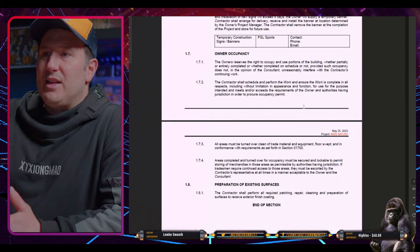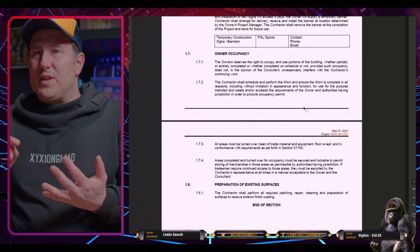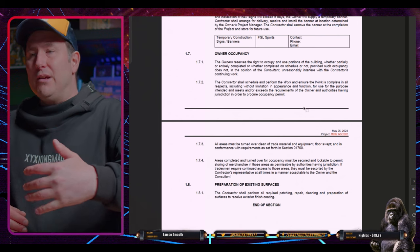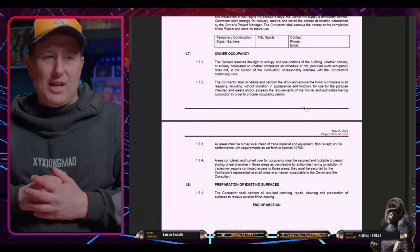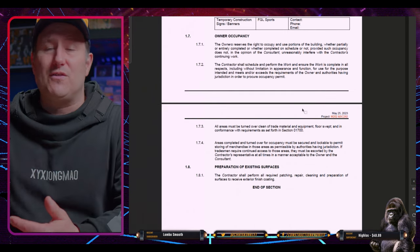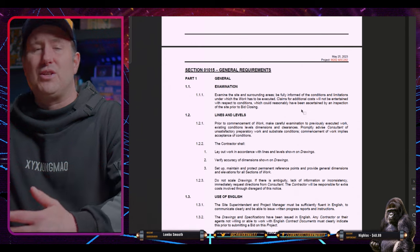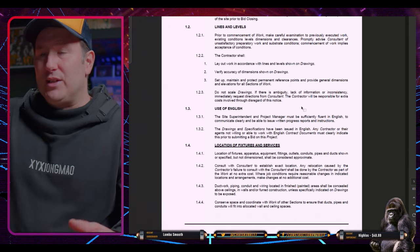Okay, it'll tell you things like your safety requirements, submittals that are required, and each division might have submittals. This is where you find out if you need to get shop drawings done or anything like that. This is what will tell you, that is the specifications, okay? It's not on the drawings, it's on the specifications. So I always hit the specifications before the drawings. And I'll familiarize myself with my divisions, which were metals, thermal moisture protection, drywall, and even finishes, okay? Those are the divisions that I'll look into.